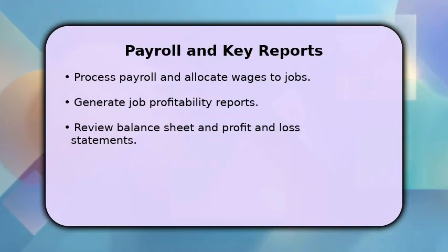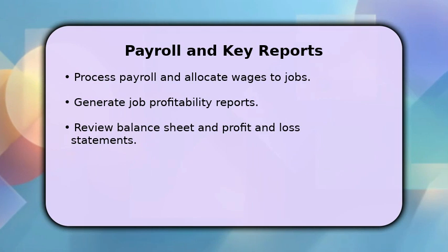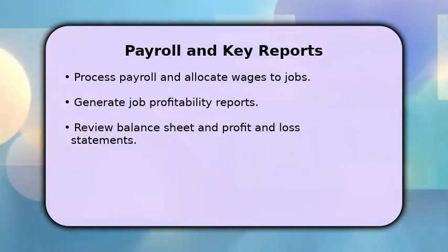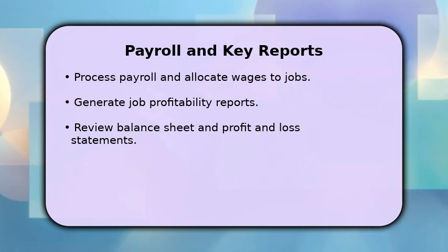Finally, let's cover payroll and essential reporting. Process your payroll within QuickBooks, allocating employee wages and related costs to the correct jobs. Regularly generate job profitability reports to see how each project is performing financially.